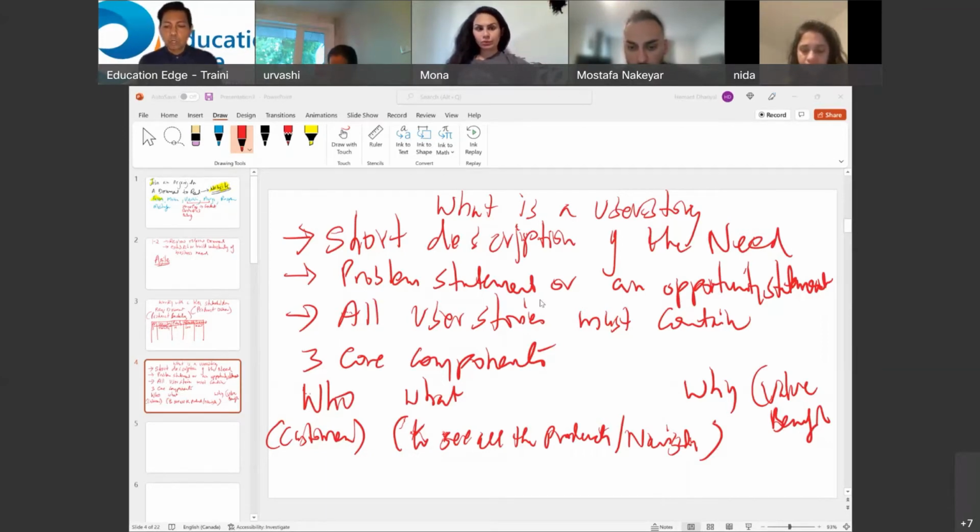Right? So if someone said, have you created a product backlog? Of course. In my most recent project, a product backlog could be a very simple spreadsheet that contains user story ID, user story description, priority of the user story, some very high level estimation, and some comments that may provide greater level of details about this user story, right? Good, everyone? Clearly, do we understand what is the user story? What is the product backlog?